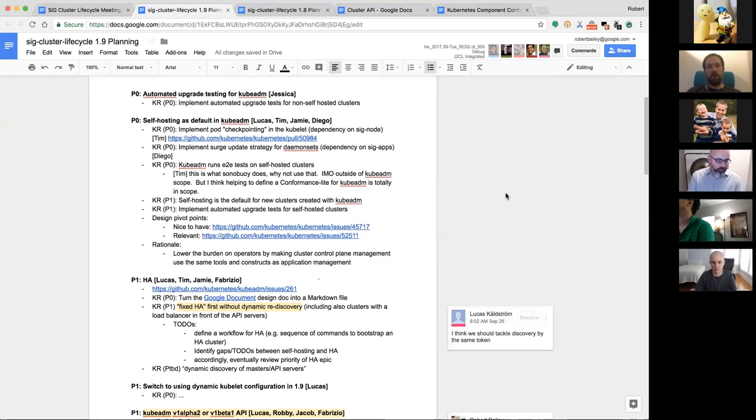Yeah, I think that's a really good point. If you are one of the people owning one of these issues, as a first task, break it down into sub-steps, file sub-issues for those, and for the ones that can be sharded out to people that want to help contribute, mark those appropriately. I think we've done a not great job at that in the past, and we just kept in our heads that this is what we have to do, and didn't make that explicit through GitHub, where other people can find it and have it be discoverable.